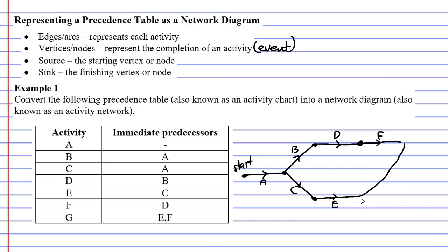I'm going to put down a single vertex which represents the completion of both edges E and F, or activities E and F on my diagram.